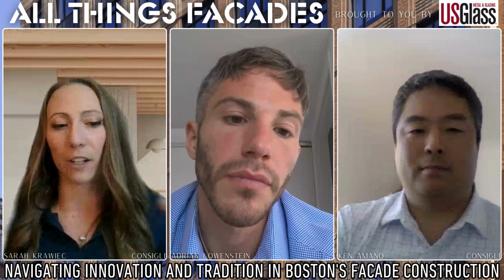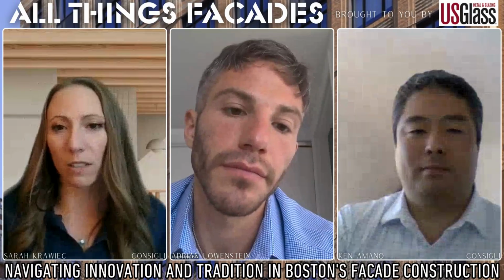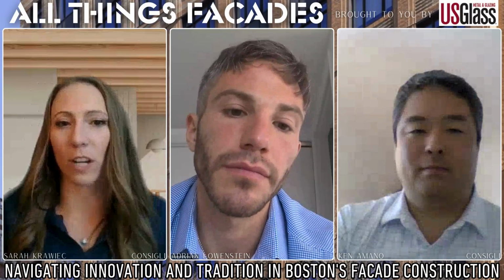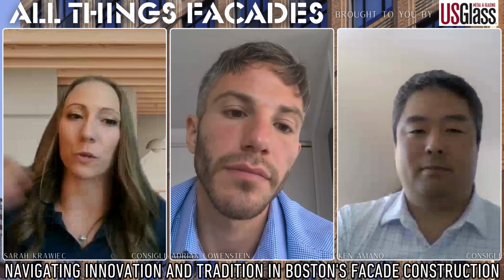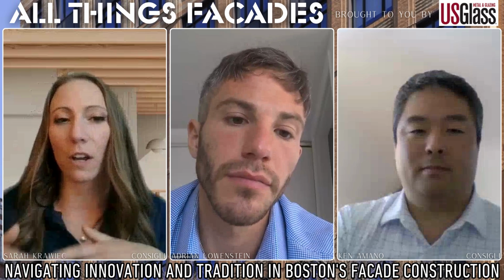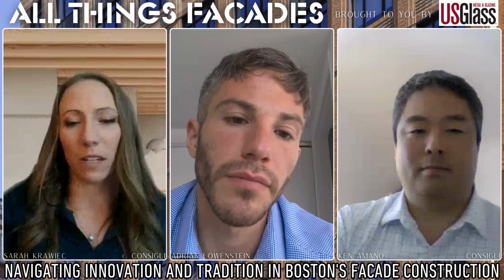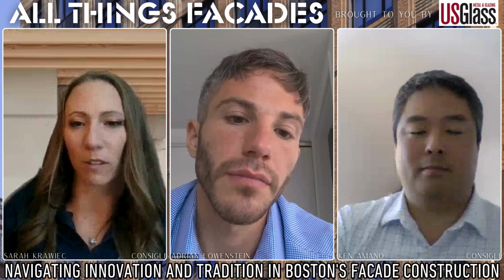And related to that, going further upstream, is how these beams or CLT are being transported to site, and what is going on on the manufacturing side of things. What's their QA/QC process? So that's also been looped into the conversation of what one manufacturer is doing compared to the other, and if one's working better, then can we make that suggestion? That type of feedback is going up different chains and ultimately making its way into pre-con to be part of that conversation.